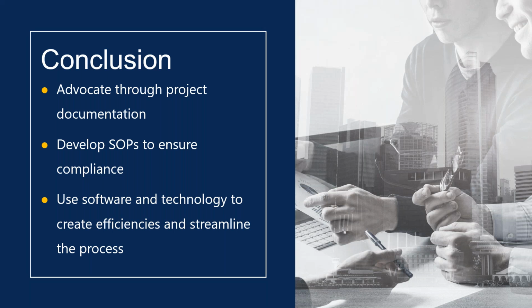So you must learn to advocate in your change orders, in your documents, everything. Advocate, advocate, advocate. Remember, if it's good for you, put it in writing. If it's bad for you, pick up the phone. Don't use text messages because they're discoverable.